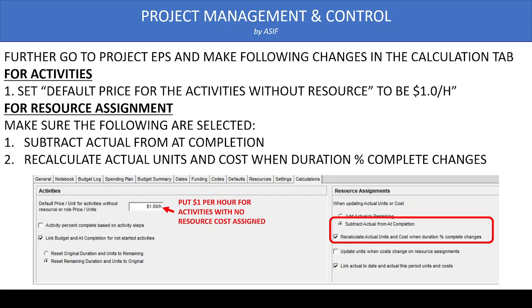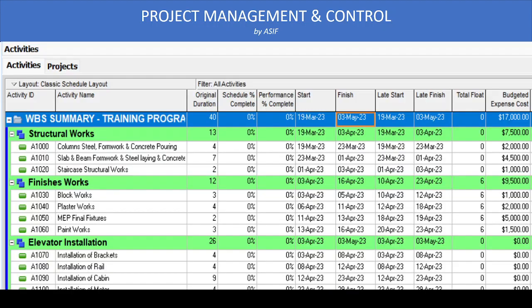Once we have made these changes, we are going to assign the costs to our WBS activity and we are updating as normal. So this is the program, a simple program with few activities, and you can see that all the activities related to costs are assigned. But for elevator installation, we don't have any breakup and we cannot assign the cost of elevator installation to this WBS level. To overcome this issue, we are using WBS activity.